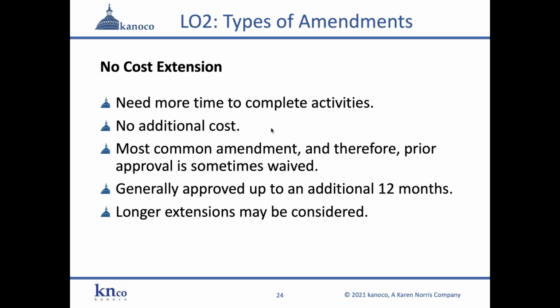It's the most common amendment, and therefore, sometimes prior approval is waived. The awarding agent says, yeah, that's okay. Just go ahead and take the time. You don't have to ask for it, but just let us know if you need more time. It's generally always approved up to an additional 12 months, and longer extensions may be considered as well.